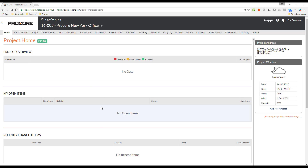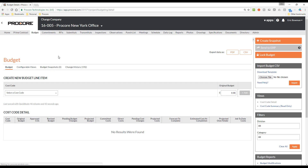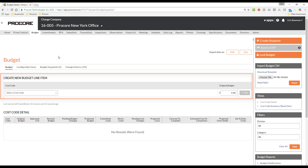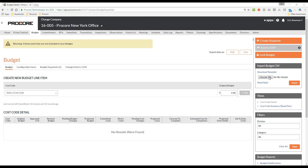Let's start by getting a budget entered, and then we can walk through the steps to sync it over to QuickBooks. Here we are inside the budget tool for this project, and you can see there isn't a budget yet. To enter the budget, we can either key it in here manually, or it can be imported from a CSV file using the Import option on the right. I will use the option to import the budget, as I already have one prepared in an importable format.